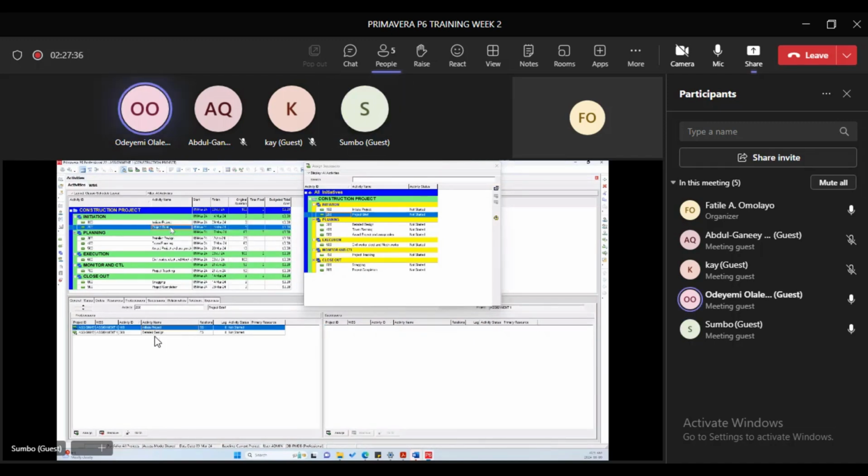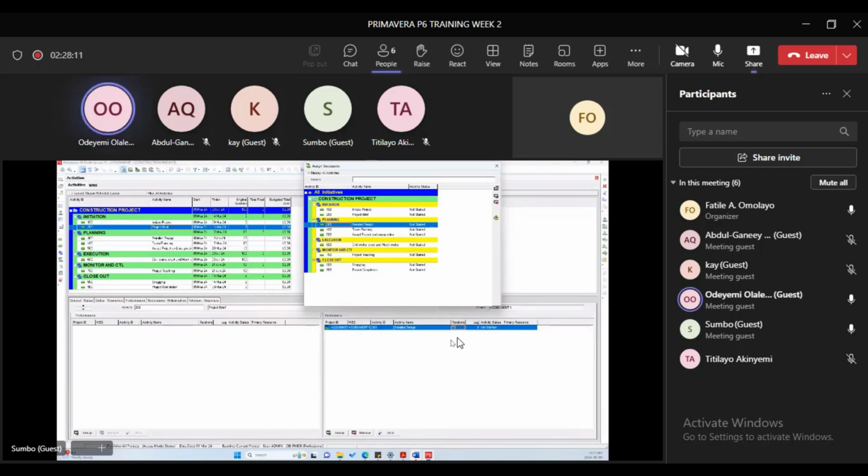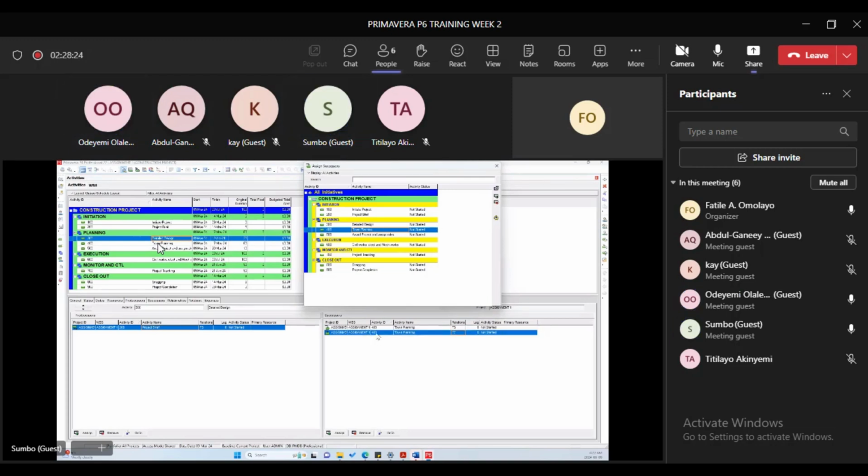Okay. Yes. So I'll now go to successor again. Okay, let me delete this. Delete whatever you want. So I'll click on 200. So now will I click on 200 or 300 to create this next one? So you are on 200 now. The successor to 200 is 300. So you click 300 there. Whatever is showing you 300 is FS. It's FS. It's okay. You are done. You move to the next one straight. You move to 300 now. So on 300, just follow it like that.